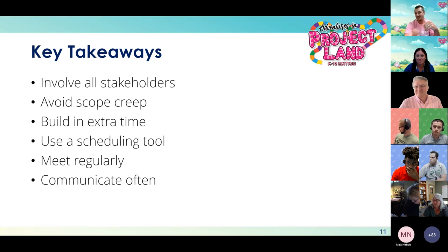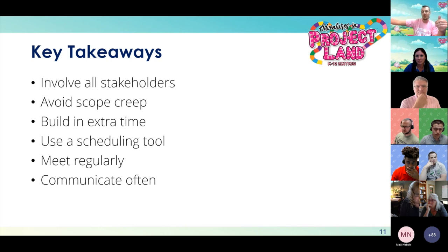One thing that we usually do is, date range is very common, or it depends on the size of the project, but we might pad the end of our phases. So our closure phase might only take like 2 days, but we might pad it to take a month, just because that's our catch-up time if we need it. I have a project right now that is going way over schedule because their discovery is just taking forever. So we're chewing up closure time that we had planned on closure. We're chewing that up at the planning phase. It's not specifically booked as contingency publicly, but that's what it's turning into. That's one way to do it, but it really does take a little bit, I think, of political savvy and kind of finesse on how you should apply that.